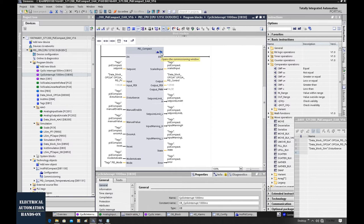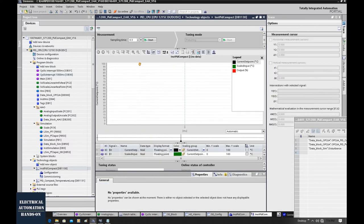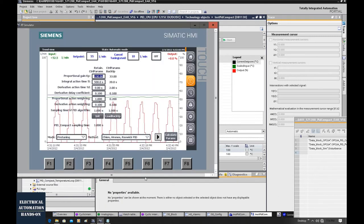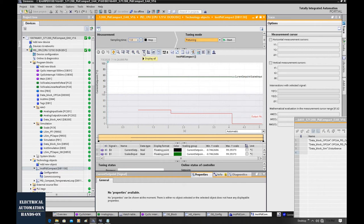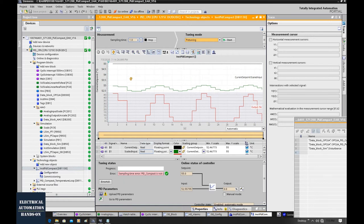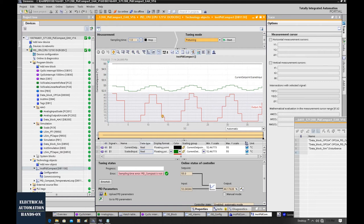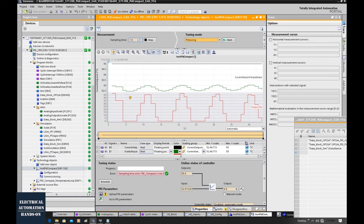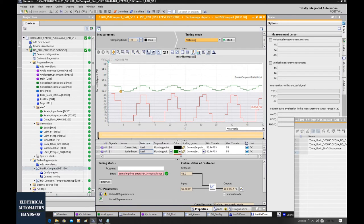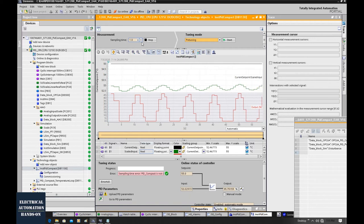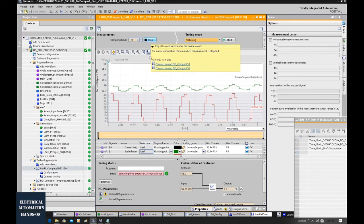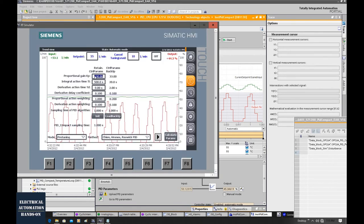In the meantime, let me go to this commissioning wheel, because we can use this ruler to measure the value. Let's change to one second sample time and hit start. Light this window to record this curve. Let's hit 100%. The green curve is the process value, and the red curve is the control signal — all of them are getting oscillation. So we can use 130 as our KCR value. For your system, you need to increase your gain until your system gets this oscillation like this, then record what the gain value is. Let's stop this curve and record the K and this period. Let's record the gain value — that is 130. So this KCR is 130.